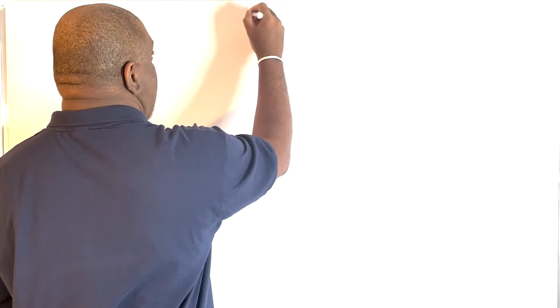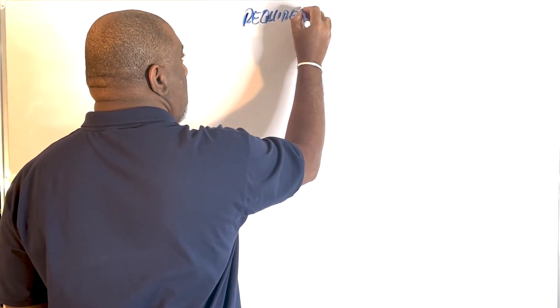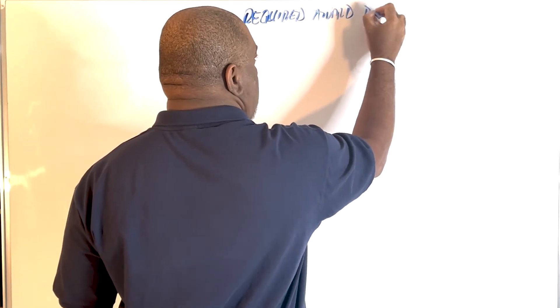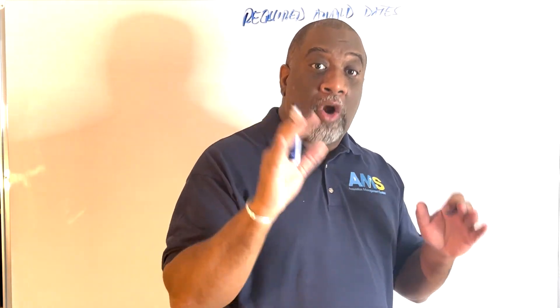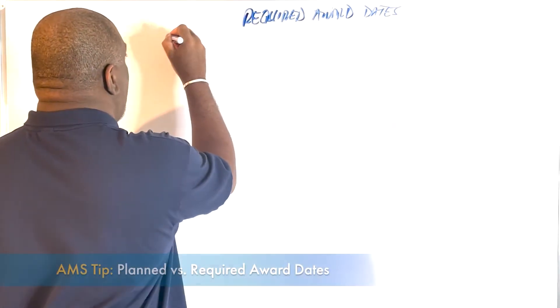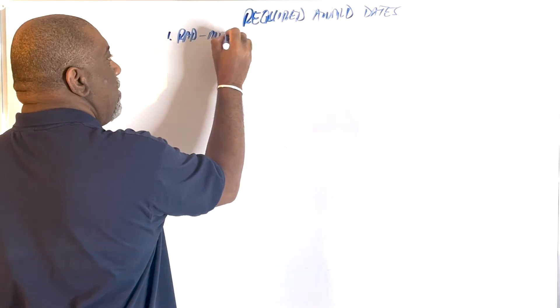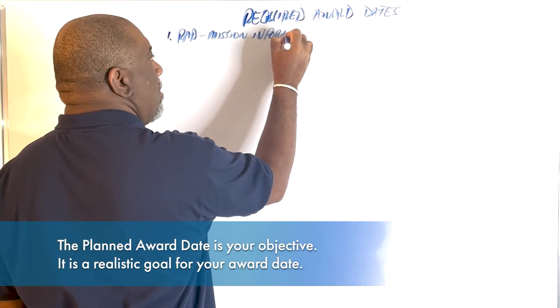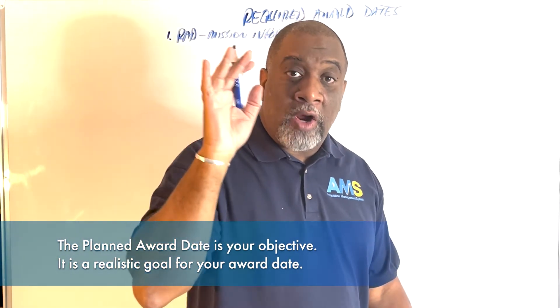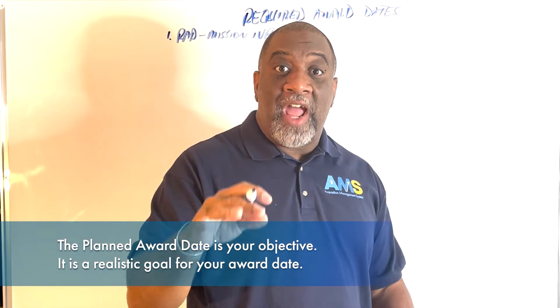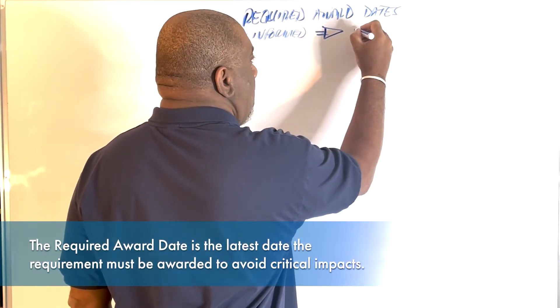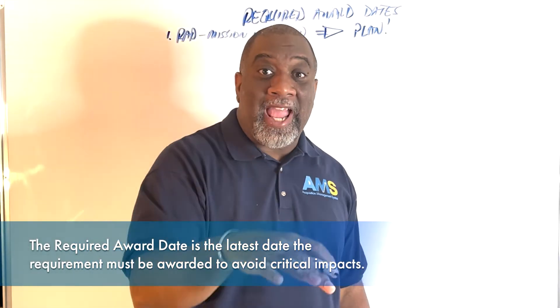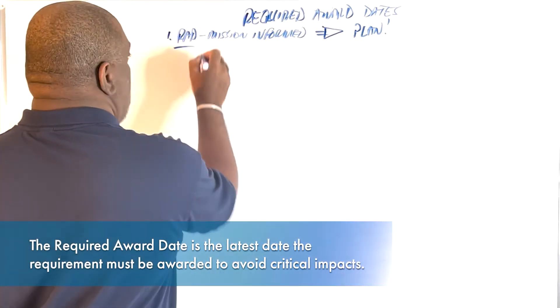One of the things you will see there is required award dates. These are the dates that are set in the system when you establish a PID from the standpoint of identifying when your requirement is needed. Please know that your RAD is mission informed. When you set your required award dates, please know that they are not informed by the plan. Actually, the RAD informs the plan. You build a plan that is reflective of your required award dates.